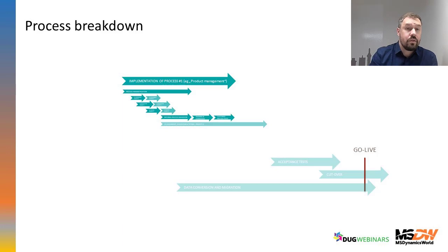Process parameterization for me means that I prepare the model environment, preparing, for example, the first items and the data, starting with assignment of the first user stories to the developers.